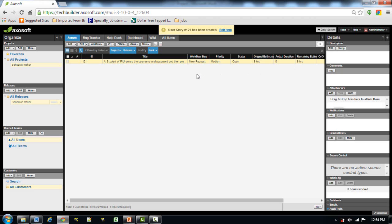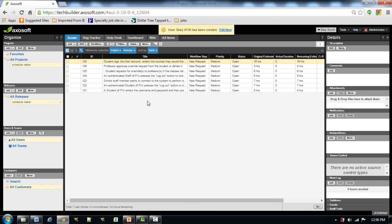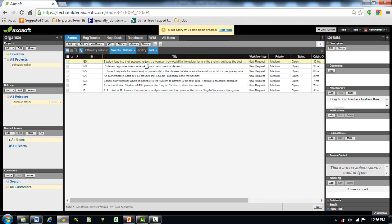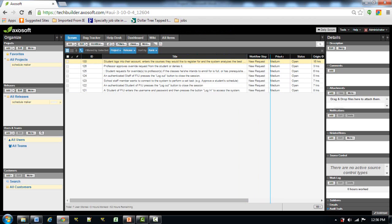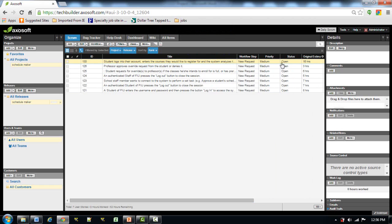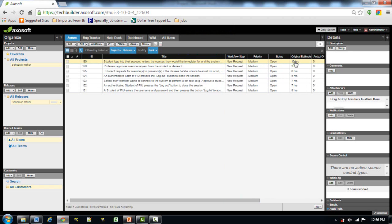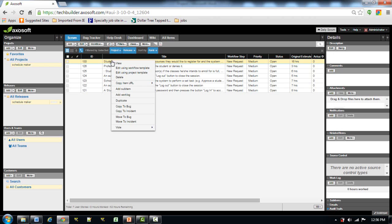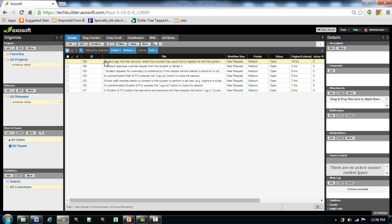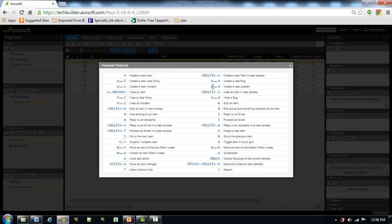Sub-items are used when the user story is quite big and cannot be covered in one day. Let's populate this list — these are enough for one scrum. For this user story — 'student logs into their account, enters the courses they would like to register, and the system analyzes the best possible schedule' — it is sixteen hours, which is more than one day. We will divide it into subtasks using the shortcut N and S.